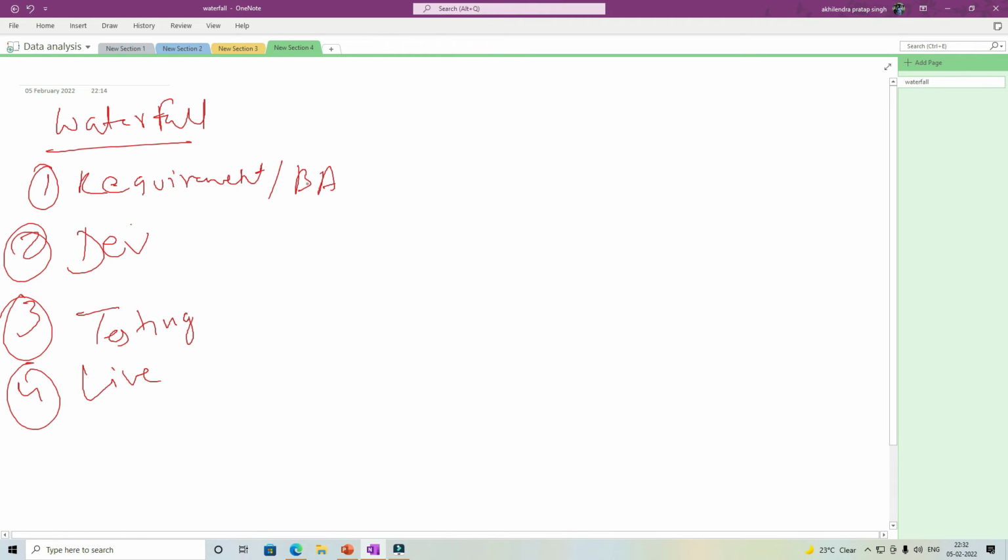So this phase is static. Now let's say if you are in this phase, you get a new requirement, then it has to go through change control board. A lot of bureaucratic processes will kick in, and we will end up wasting a lot of time. And when there are lots of new requirements, then the entire project itself becomes a problem, and the project itself could be at risk.